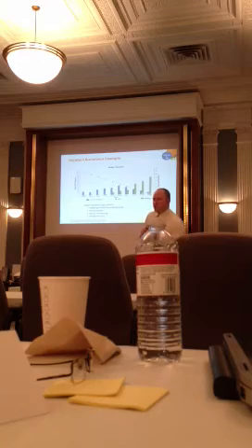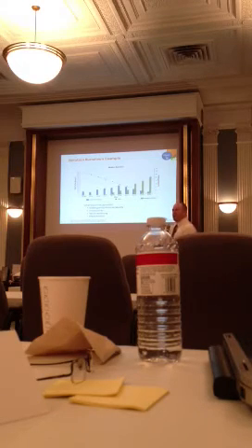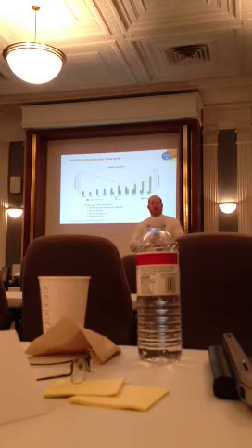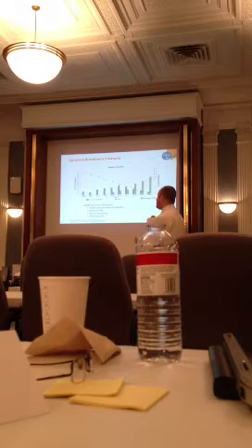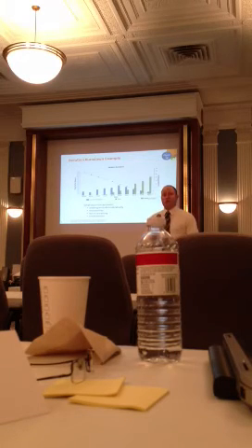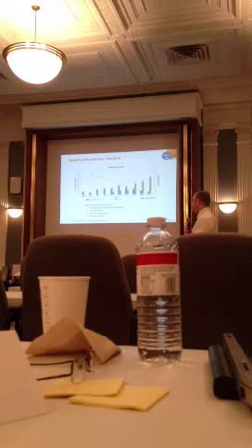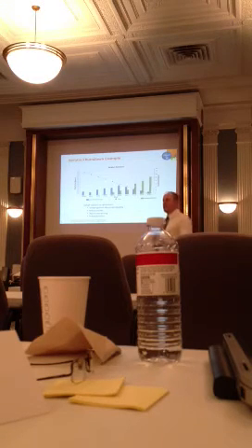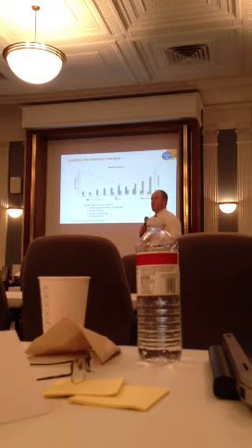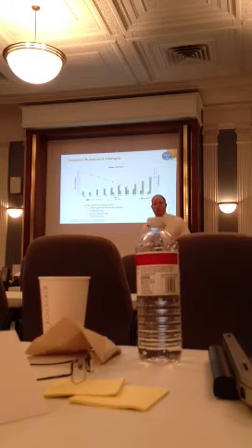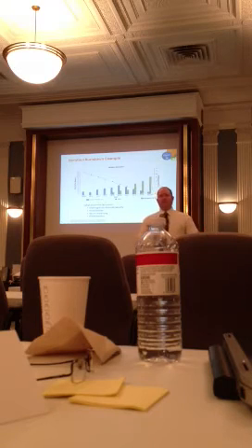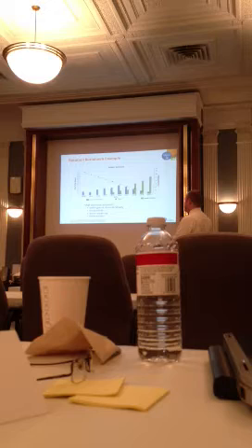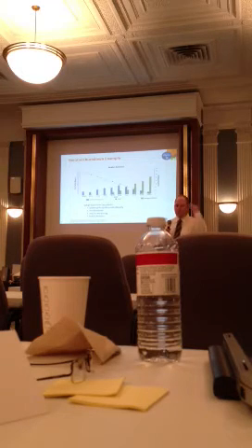Okay? So in our retrospective, when I looked at this graph, remember I told you we used to have our grooming sessions and our planning sessions on the first day of the iteration, which now you can see, we committed to stuff, but we really didn't know what we were committing to. Then we spent the next few days breaking this down and understanding them. We're breaking down more tasks. So when we retrospected on this, I looked at this and said, well, we don't get our first bit of acceptance until day 4. We should move our planning session, our grooming session, back to 3 days before the iteration starts. So this chart would shift back 3 days, at least in my head.